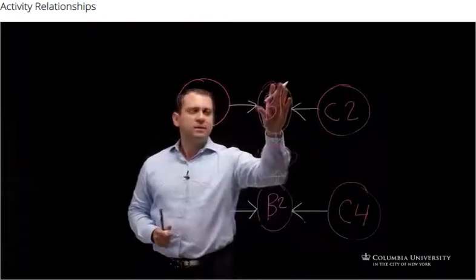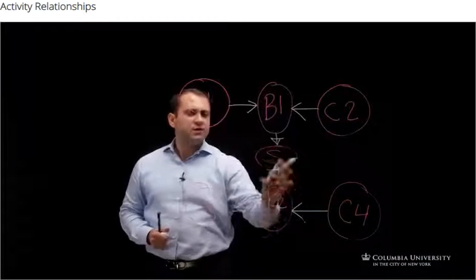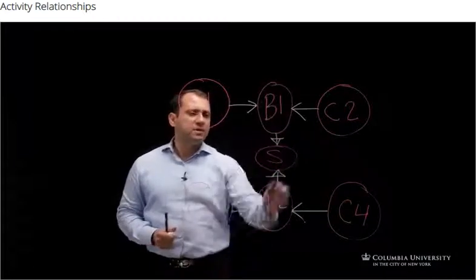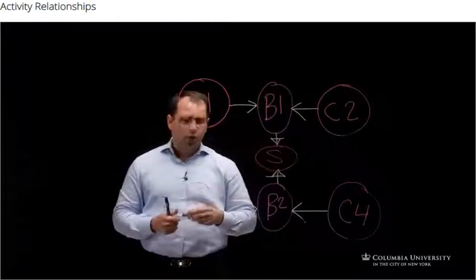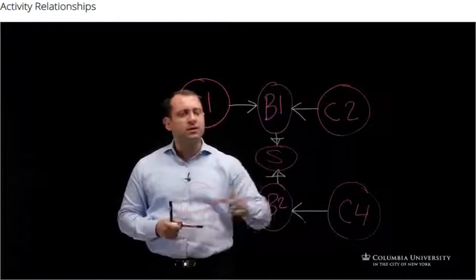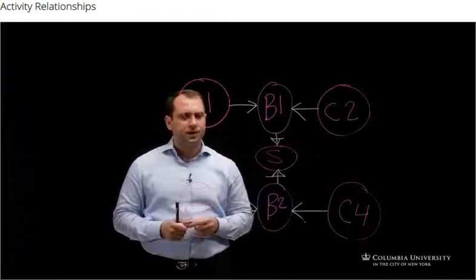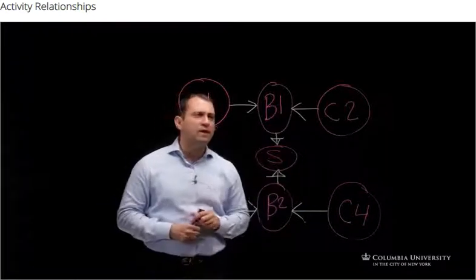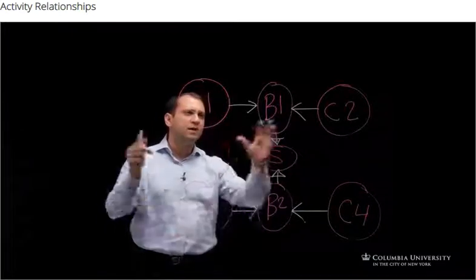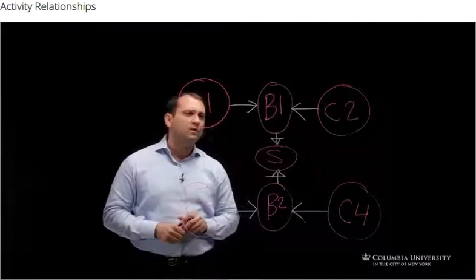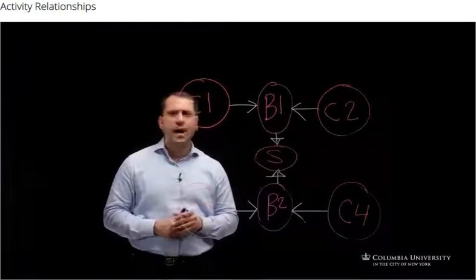So when you build and finish both of the beams, then you can start work on your slab. This is also a physical or a technical relationship. So here we have the logic behind building this small, simple structure that we have.